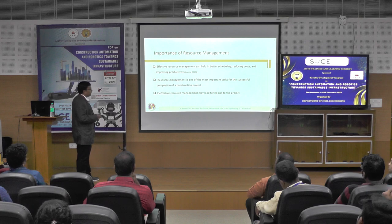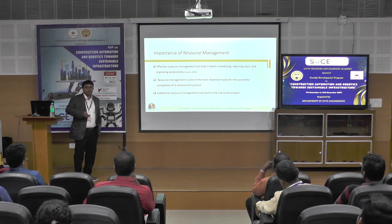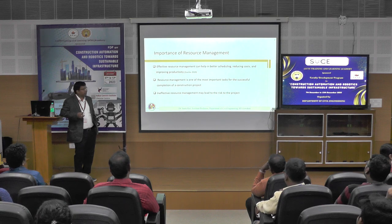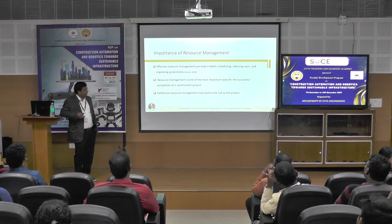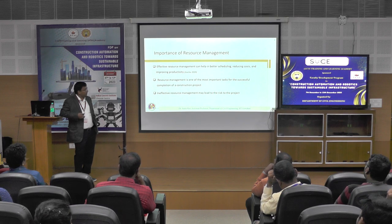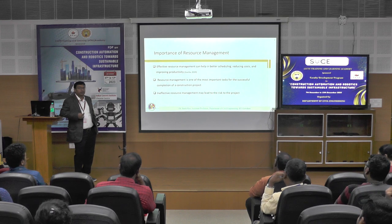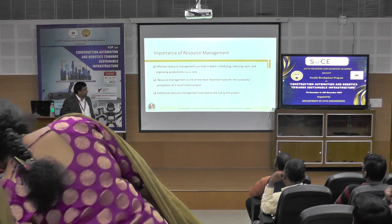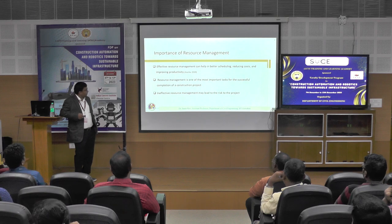Effective resource management can help in better scheduling. If materials and labor are available on time, execution can be completed on time. Their unavailability can delay activities and thus delay the project. They can also reduce cost if engaged on time, considering the cost of acquisition, and improve productivity. Resource management is one of the most important tasks for successful completion of a construction project.